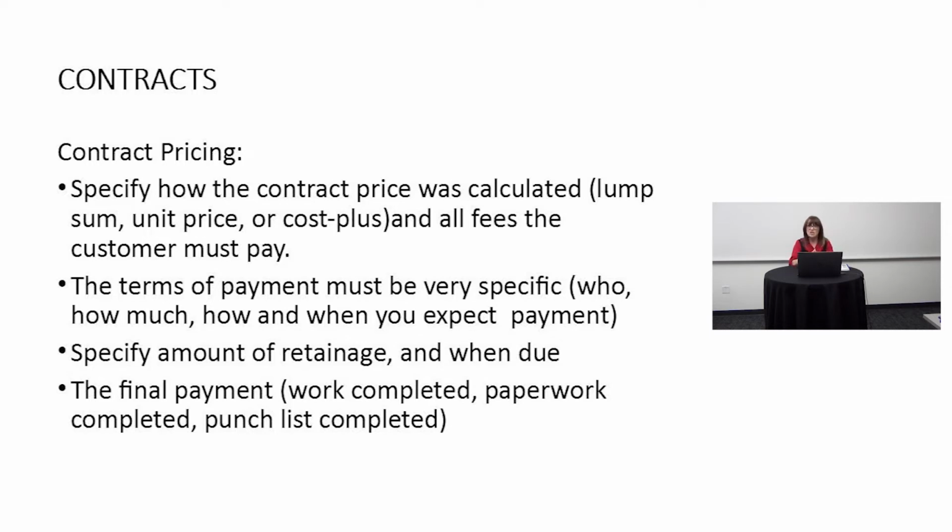If the retainage seems high, you want to know, when am I going to get caught up? Are you going to pay me this retainage every 90 days? This is a 9-month project. Or do you insist on holding it to the end? Can't you change that for me? So specify the amount of retainage and when it is due.